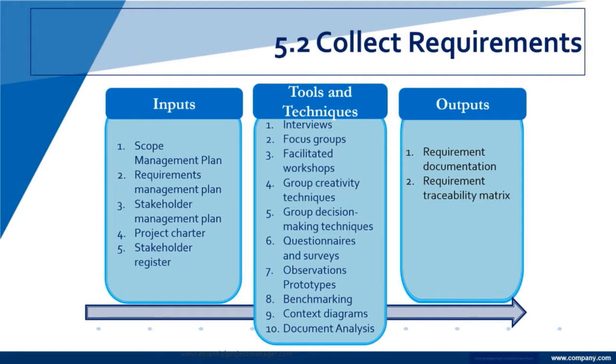When the requirement becomes a deliverable, we track it all the way there and even beyond into the testing of it, into the actual deployment of it. So the traceability matrix is not a strict guideline, but it gives us a device to be able to keep up with everything and make sure at the end that if we required something at the beginning, that we actually deliver it at the end.